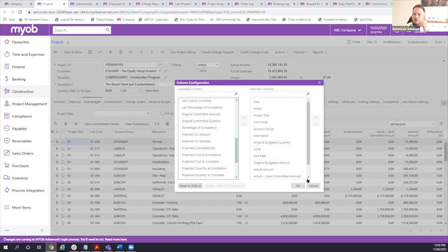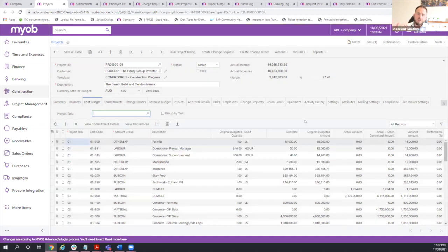And also including the commitments. I think a lot of companies always have a bunch of purchase orders open and want to see how that actually impacts things if they had to add that to their actuals, and what that picture looks like, right? So I can see on the screen one of your columns has got that committed in there as well. Definitely. Yeah.